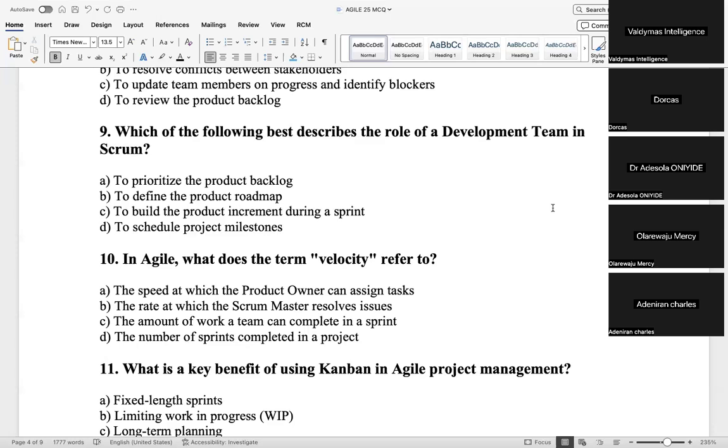So let's now say, and I'm not giving an example now, that we go into a sprint with 4 stories. Each of the stories is 8 points. But at the end of the sprint, we're able to complete 3 stories completely. But the 4th story, we're only able to do it halfway. I now say, what will be my velocity? So your velocity is supposed to be 28 because each story is 8. Correct. 8 points. But the velocity is only the amount of work completed that you must total. Don't total anything that was done halfway.